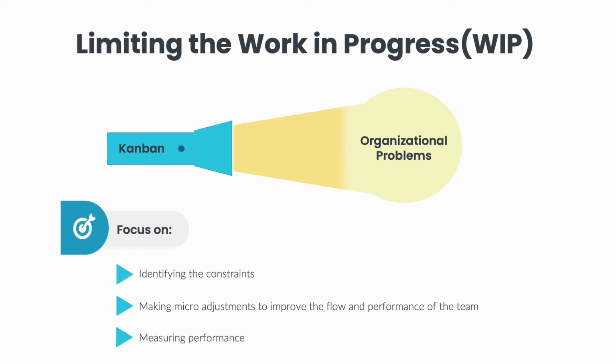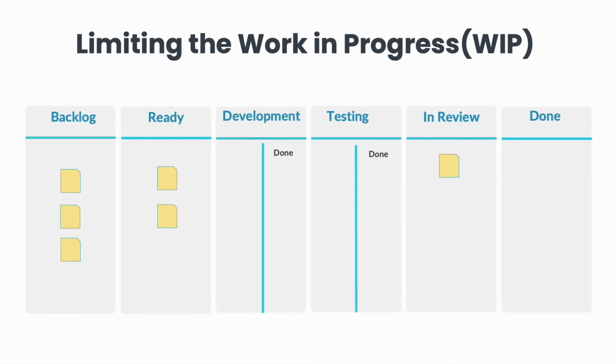Try to be flexible with your team at the beginning as you start your Kanban implementation so you don't overwhelm your team. With that said, not setting any WIP limits will result in lower productivity. This is because in time, team members tend to accumulate lots of items in progress across the entire Kanban flow. This will look like the team is busy and working on a lot of items. However, at the end of the day, your goal should not be to look busy, but to actually get as many work items fully completed from end to end as possible. WIP limits will help you achieve exactly that goal. Next, let me show you how to implement these WIP limits in the Jira software.